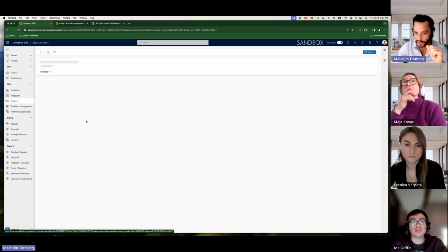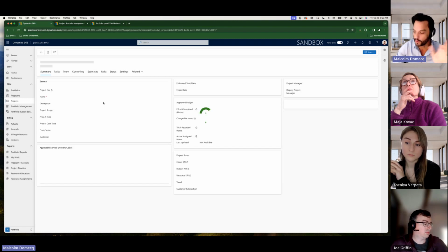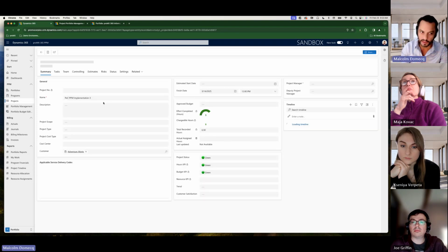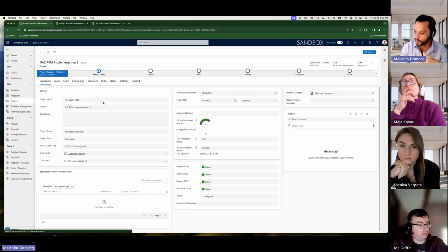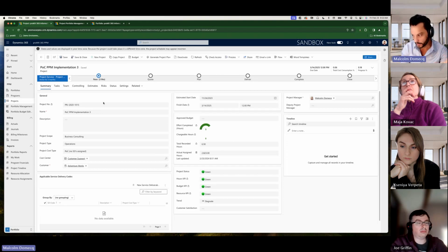As I create a new project and I drill into the project information, I add a portfolio. Let's say that I started with my whole project and I put a budget of $12 million, and I say, now this project will be part of this portfolio. As soon as I put the portfolio, it says, oops, you're going 2 million over the budget of the portfolio. So that's the whole idea of the controlling part of the portfolio, getting those notifications.